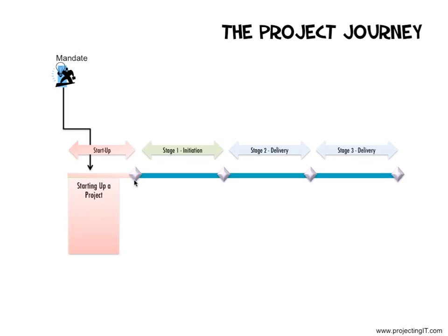Each process receives an input, has some defined activities to do, and has a defined output. The output then becomes an input to the next process in line. There are 7 total processes in PRINCE2. Each process defines the management work to be done at that time. The processes are written for 3 PRINCE2 roles.